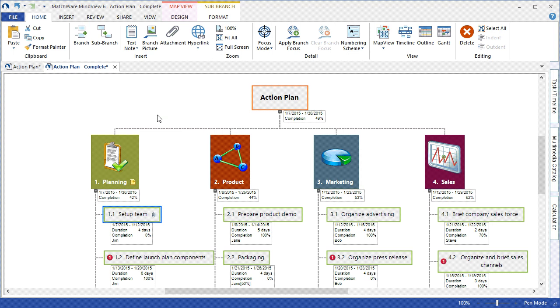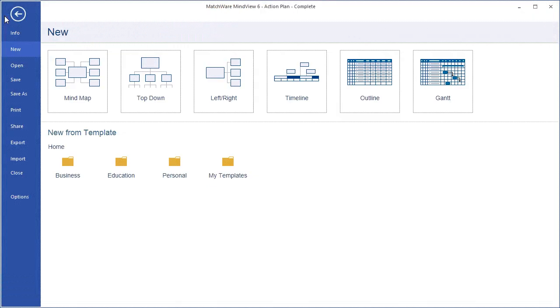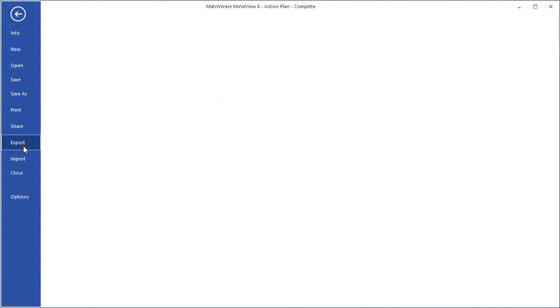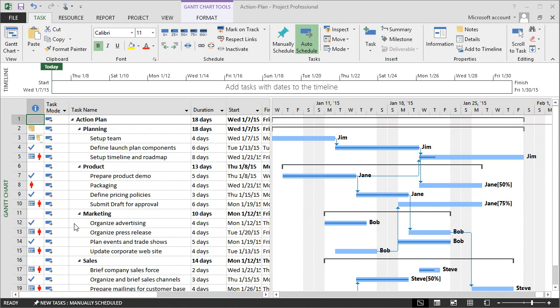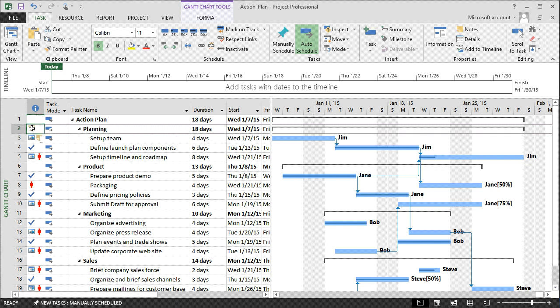For our Microsoft Project enthusiasts, MindView can communicate directly with Microsoft Project by choosing Export, MS Project. As you can see, the MindView document has been converted into a standard Microsoft Project file with the corresponding task information, any notes or descriptions that were brought over from MindView, resource allocation is included, as well as predecessors.